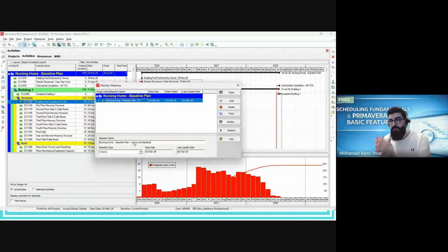So what is the meaning of that? I will lose the traceability. So instead, in all cases I'm obliged to modify the same schedule, but at every cutoff, at the end of the week or the month, depending on whether it's a weekly or monthly update, I will create a baseline, but it's not a baseline, it's a backup of the update. Okay, I will make it the update of the cutoff date.